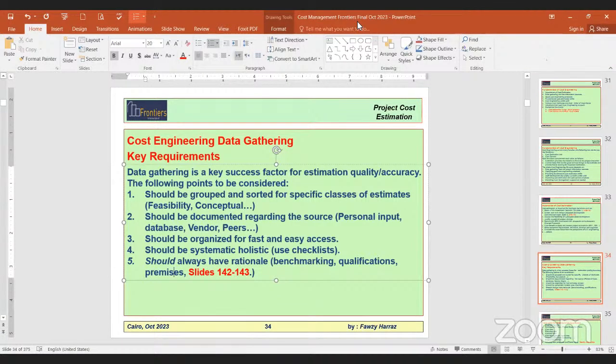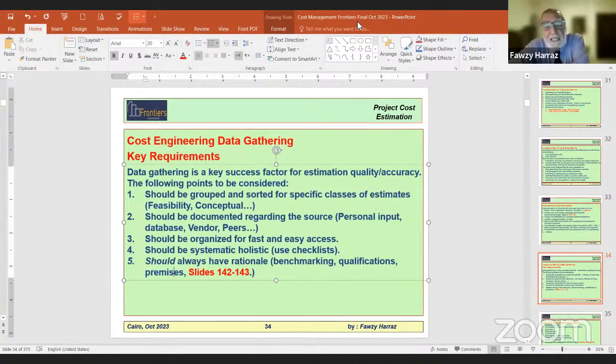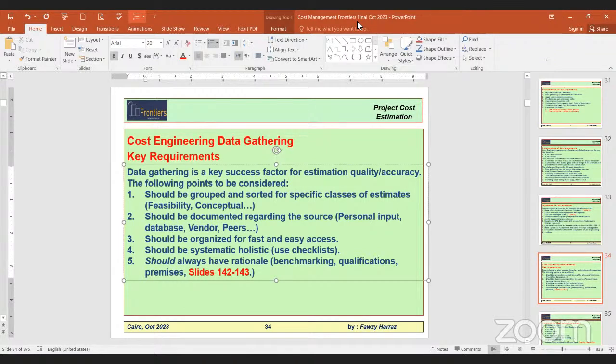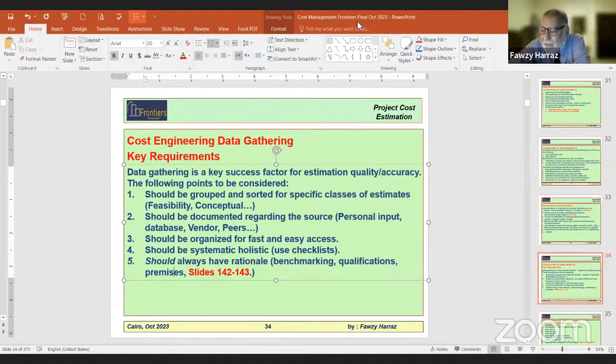But we can keep it for a good variation order, especially if the unit rates are not in the BOQ rates. It's not included, so you are free to give a high unit rate and make it a winning job, if it is a big item. The consultant and owner do not know that you knew this at the bid process. So you just say, by the way, when we are reviewing the project documents, Mr. Client, Mr. Consultant, this item is missing. The only way to include this is to address a change order, right?